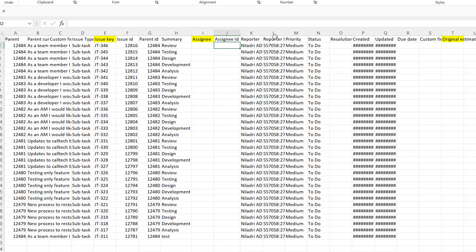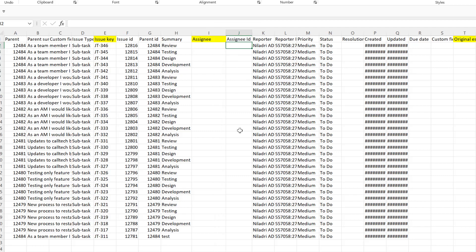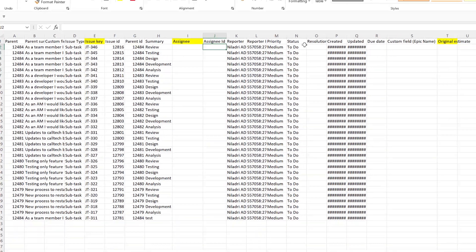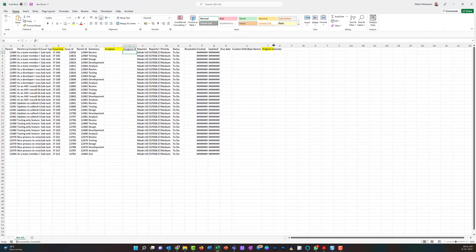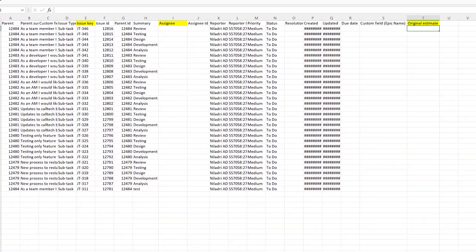For assignee IDs, I'll leave that blank and just use the assignee field. One important thing: whenever you are adding the original estimate, you may want to handle the assignees first. Remember that in this case we need the email ID that is registered in Jira — that email ID is what we'll use.